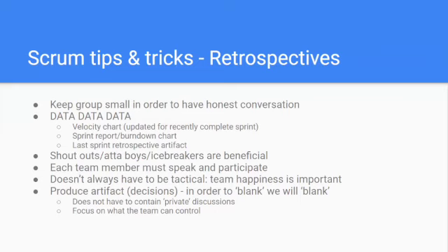Yeah, virtually I would do those power retros in 30 minutes or less, and I would do them in Trello. And I would use the Kanban board in Trello because I didn't have any other tool I could use. And I would use the sign up for a card feature to do dot voting. Anyway, if you're interested, I can show you how I did it. But I would literally turn it into process and procedure changes from not just the stop doing, start doing, and continue doing, but oftentimes the best changes came from the shout outs.